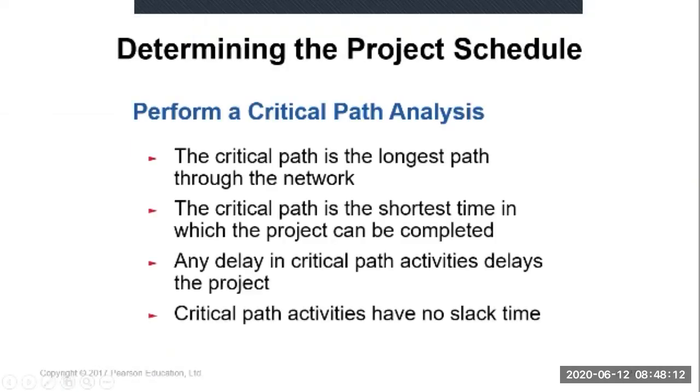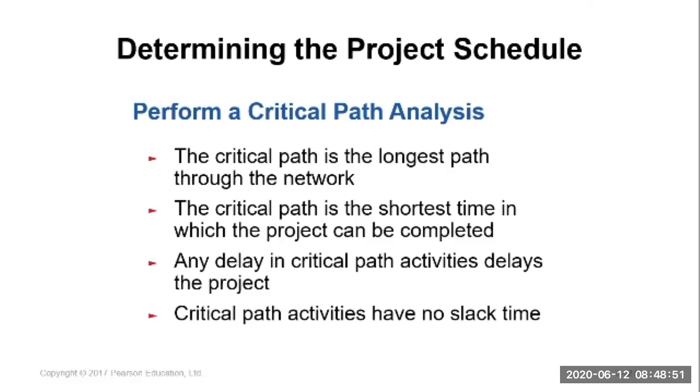Right, now we will do the critical path method, CPM, sometimes referred to as critical path analysis. Based on this method, we will identify the longest path in the network. This longest path will show you the shortest time in which the whole project will be completed, or the earliest the project can be completed. This will determine the critical activities, meaning that if you delay any activity in this critical path, you will delay the whole project.